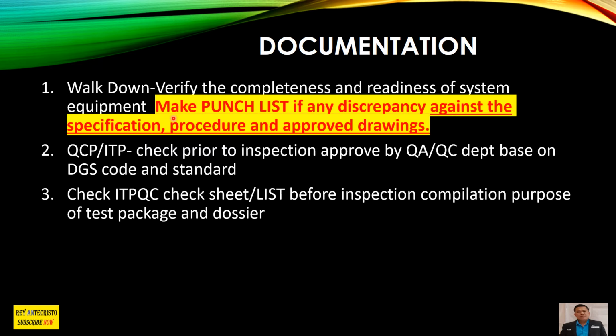Everything is there in the mechanical completion dossiers: the drawings, the red line drawings, the mark-up drawings, punch list close-out, punch list outstanding, and relevant documents as well. Okay, and also your certificate. That's why the important thing is the signature that you agree.